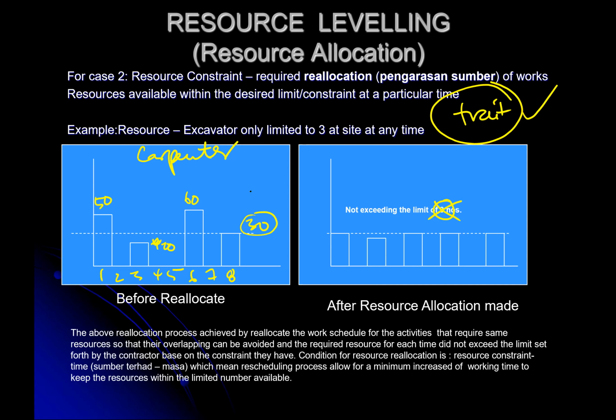Why do we want to limit? Well, there are many reasons. One of the reasons is we can manage better. When we limit to a certain number, we can manage it better, or maybe we could not get more. It is difficult because this month we need more, and the following month we need less, so it is very difficult to manage. It is better to have one fixed number of people, then we make do with whatever number of people we have. So for the first month, you notice that we can only do this portion if we limit to 30.